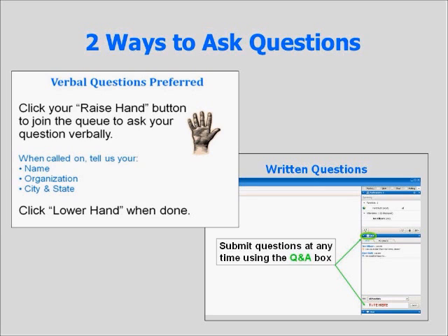Hey, this is my question. I have a developer's agreement, and we agreed to a 10% developer's fee. However, I received one of their budgets for one of the properties that they're going to rehabilitate, and they are now charging me a 10% builder's fee for the contractor that they hired to carry on the development of that property. I don't think that is included in our developer's agreement, and I was supposed to assume that the 10% covered everything. So I don't have any way to justify the 10% builder's fee that they are charging me on top of the 10% developer's fee.